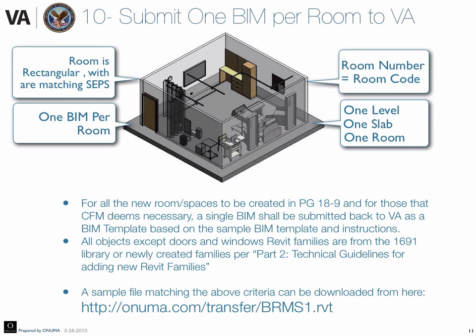So for all new room spaces that are to be created, and for those that the VA team deems as necessary, a single BIM shall be submitted back to VA. And our recommendation is to use BIM throughout the department update process and not only at the end of the project as a deliverable.